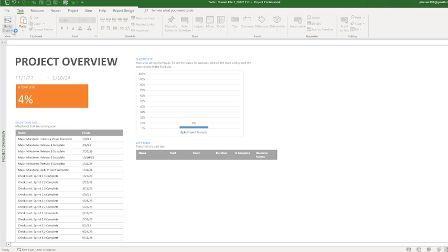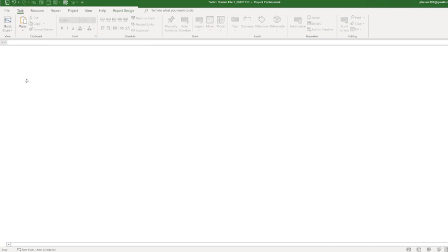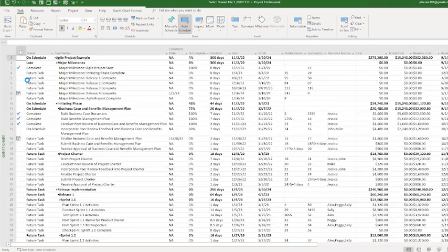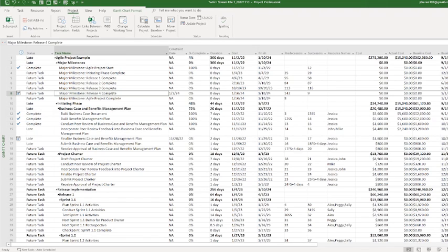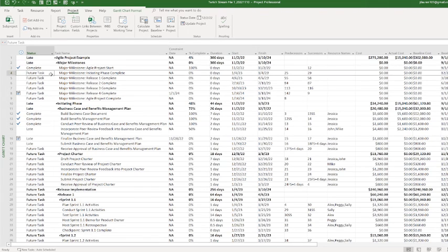So watch this. I'm going to go back to my Gantt chart, and I'm going to go to project. I'm going to change the status date. And let's, again, for funsies, let's set it to December 2nd and hit OK. It's taking a minute to think about it. All right, so now as you see, these are the items that are late only, right?